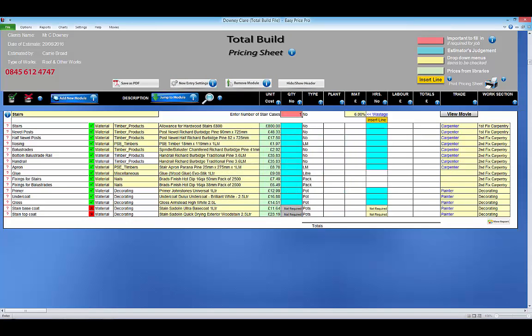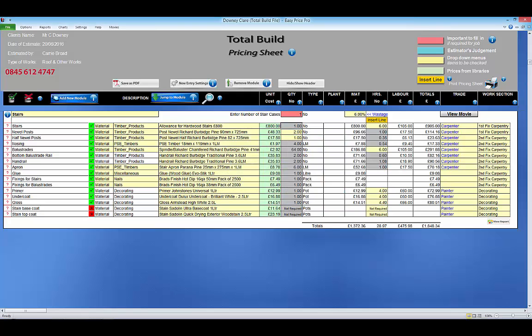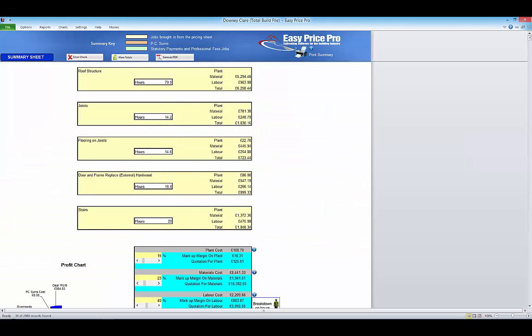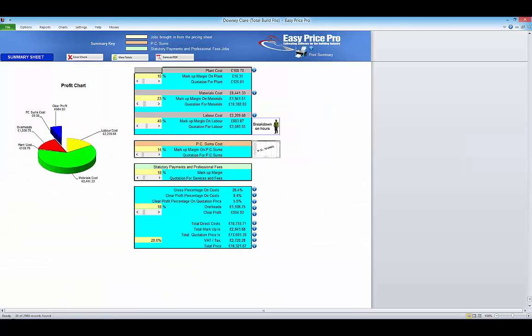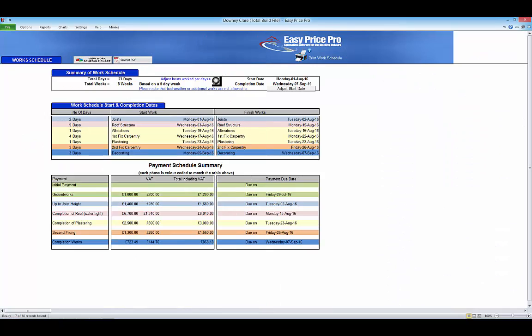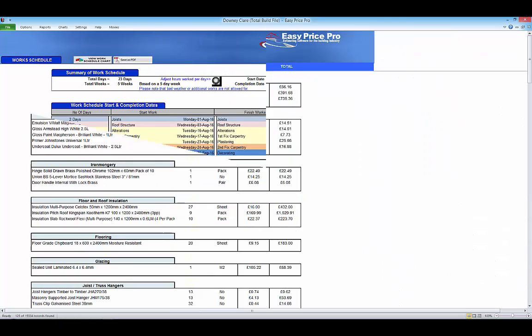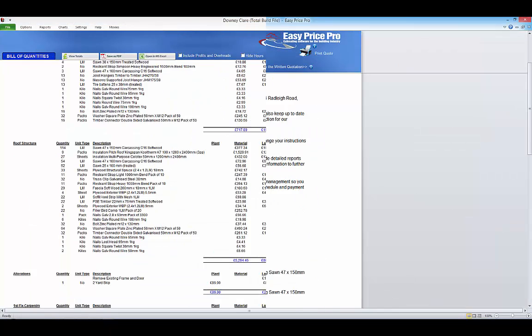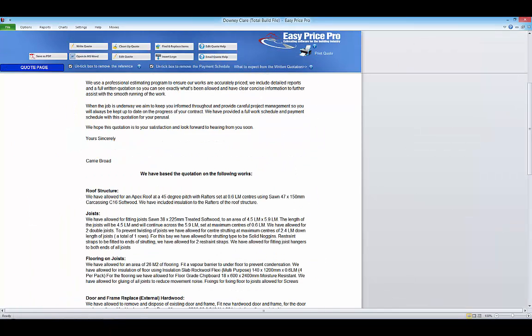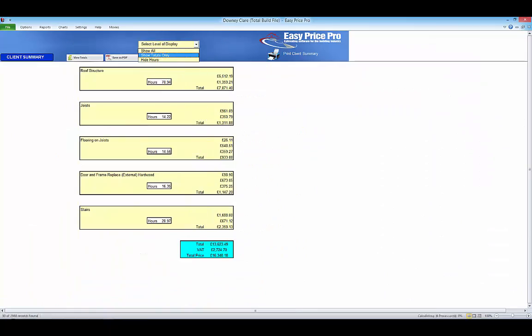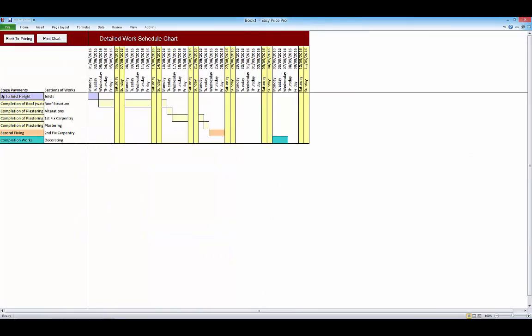All the reports are generated automatically as you're pricing the work and can be accessed at the click of a button. When the pricing sheet is complete, click the summary report to set your mark-ups and overheads. Generate the payment and work schedules, a material list and bill of quantities, produce the written quote and client summary for your client and access further charts.